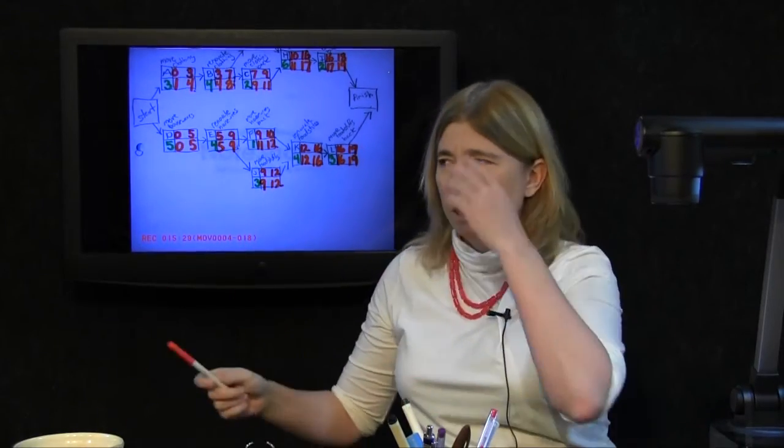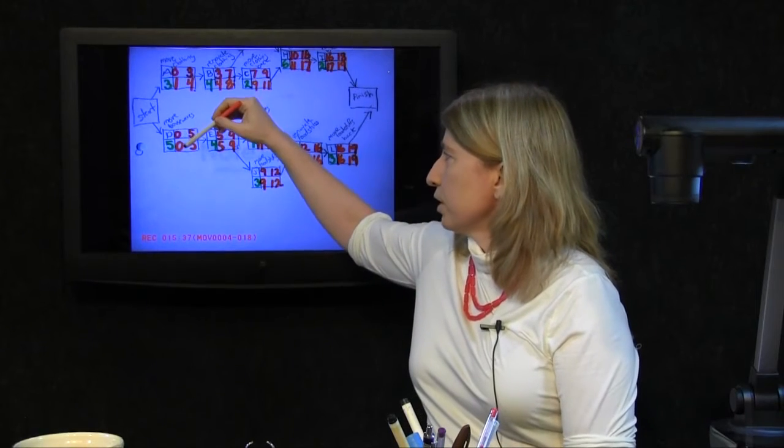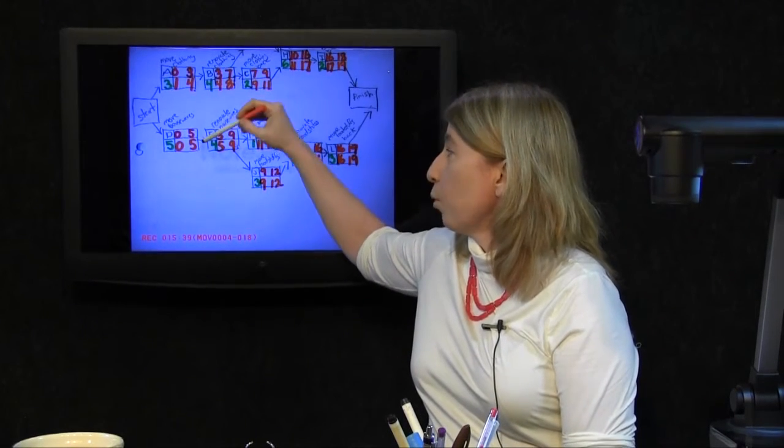The question was, what's the critical path through this network? And we remember the critical path is a set of all activities with 0 slack. And we remember that slack is the difference between, for instance, the late start time and the early start time, or the late finish time and the early finish time. Either one will get you the same answer.